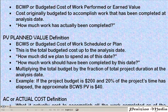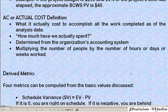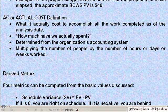So we've talked about Earned Value and Planned Value. Now let's talk about Actual Cost. Actual Cost asks the question: how much have we actually spent? What did it actually cost you to accomplish all the work completed as at the analysis date? Remember the example — the work is worth one hour, $10 an hour. How much have we actually spent? $20. So I've spent $20, and that's my Actual Cost. How much did I plan to spend at the end of the second hour? I planned to spend $20.